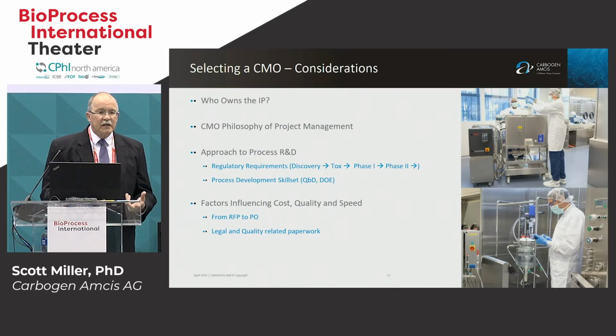Don't forget that as an innovator or as a developer, you might have a timeline that may not mesh with the real world. So keep that in mind. The legal and quality related paperwork may actually prevent your starting on time. Something to remember.